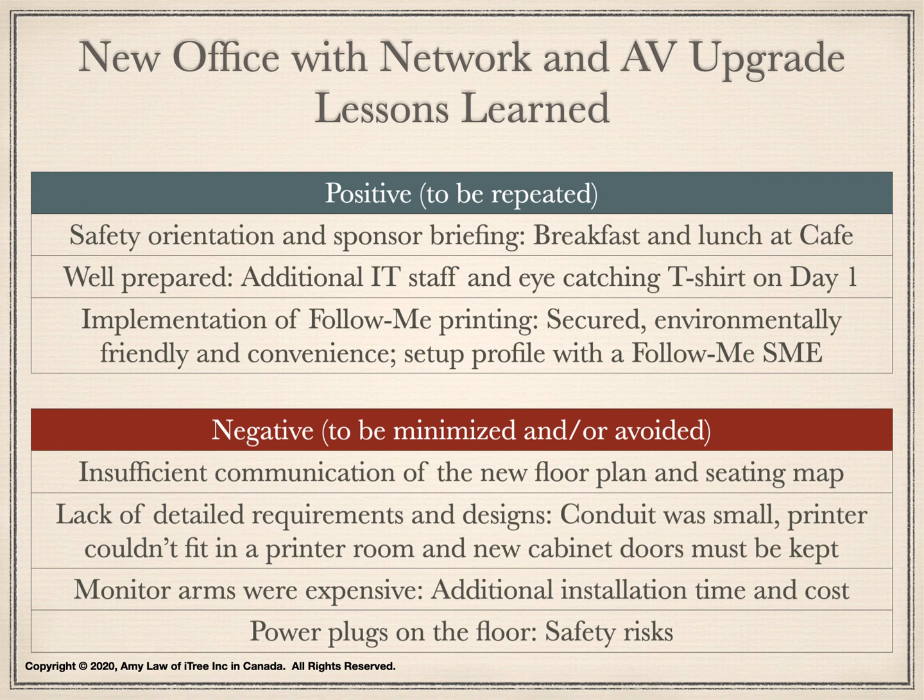Another important requirement was missed related to network infrastructure. When we upgraded the network room, we added new server cabinets. The server cabinets came with doors. By default, the network analyst preferred to take out the cabinet doors to accommodate the narrow space in the network room. During the final walkthrough, the project champion indicated that the cabinet doors must be attached and locked to ensure no one can tamper with the connections, even though the network room was fully secure with a swipe of the ID card. This type of requirements detail should have been identified at the beginning of the project.